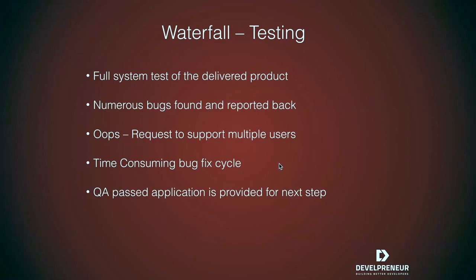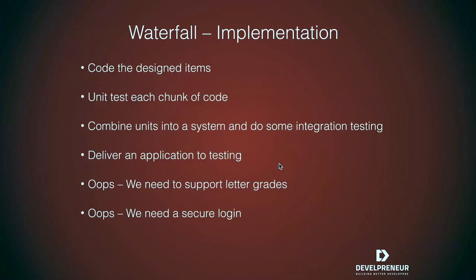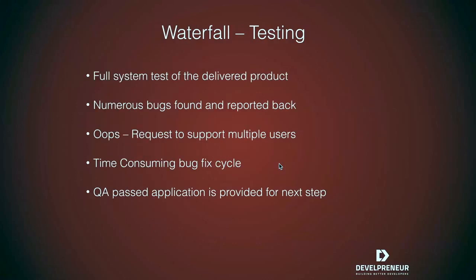There's a downside in this that I haven't really touched on yet: it could be a very time-consuming bug fix cycle. When you look back at the implementation, they were doing unit tests and maybe a little bit of integration testing, but this is really the first time all of this has been brought together and we've tried to actually make all of this code work.